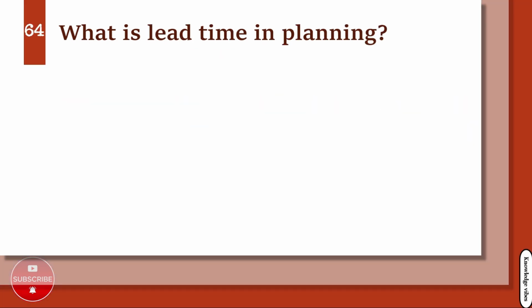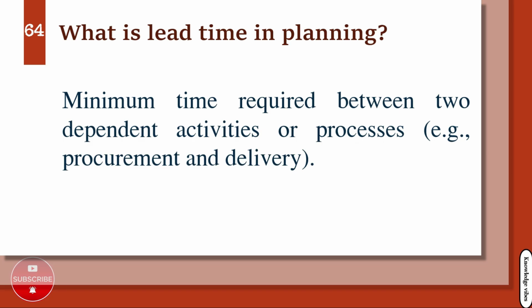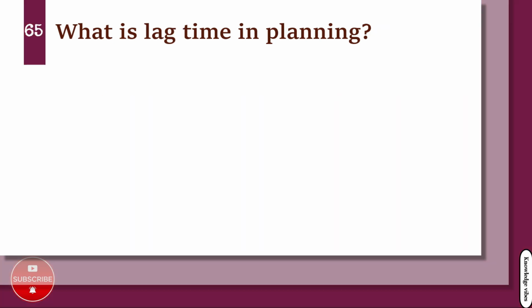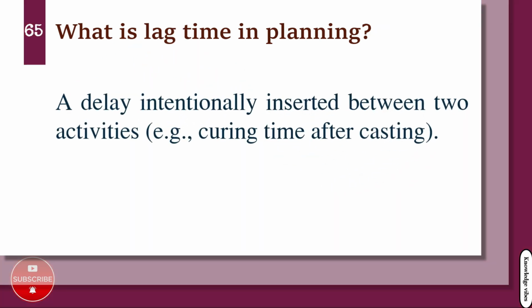What is lead time in planning? Minimum time required between two dependent activities or processes, e.g., procurement and delivery. What is lag time in planning? A delay intentionally inserted between two activities, e.g., curing time after casting.